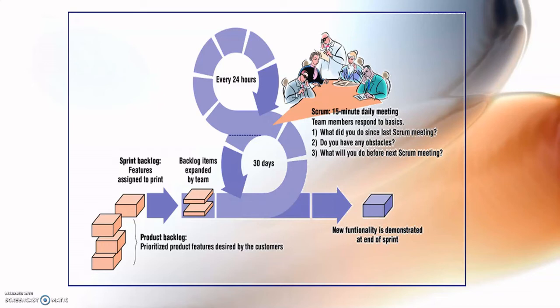Then we have demos. Demos deliver the software increment to the customer so that functionality that has been implemented can be demonstrated and evaluated by the customer. A demo may not contain all planned functionality but contains functions that can be delivered within the time box that was established.